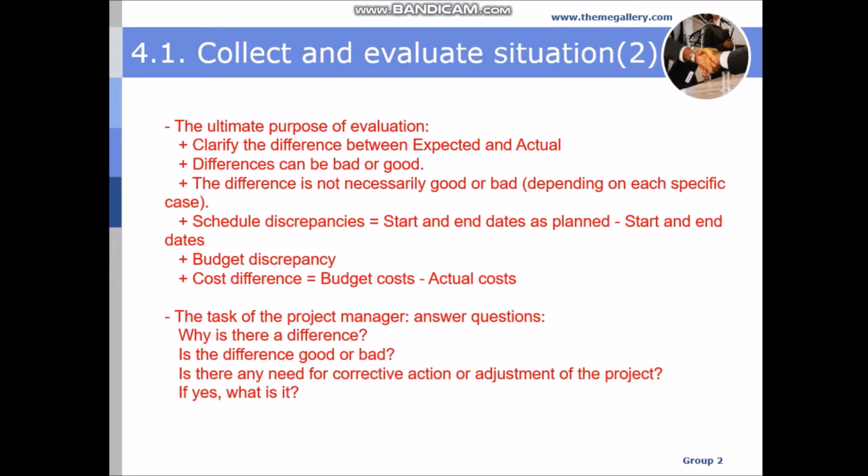Cost discrepancy equals planned cost minus actual cost. The task of the project manager is to answer questions such as why is a difference good or bad? Is there any need for corrective action or adjustment of the project? If yes, what is it?